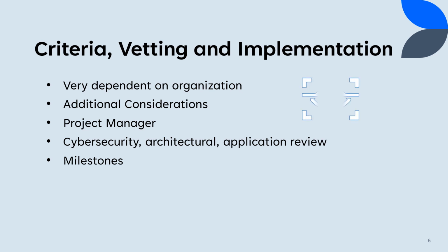The project manager will know when to take the system through architectural, cybersecurity, and application review, and guides the process through red tape and barriers. Each one of those systems, cybersecurity, architectural, and application, will review the system and then produce a report whether the system is valid from their perspective and provide recommendations. From an implementation standpoint, the project manager sets the deadlines that the build teams need to hit to ensure everything is ready for the go-live date.